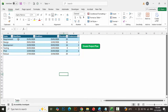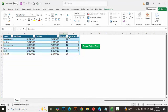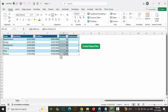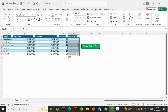I have created this particular table in Excel with five different columns: task, description, start date, end date, duration, and predecessor. I have defined my tasks starting from requirement, design, development, testing, pilot, and rollout. You can define your start date and end date of each task. The duration column comes from a formula, and then you can put your predecessor here.